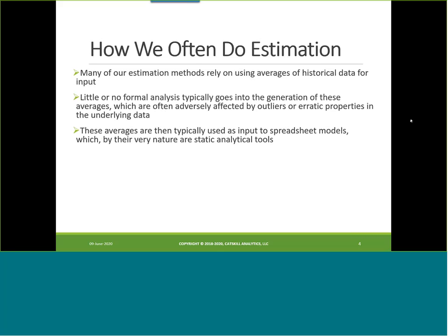What happens with the averages? Then they're typically used as input to spreadsheet models. Unfortunately, by their very nature, spreadsheet models are static analytical tools. In fact, that's why we like spreadsheets, because if you put the same thing in it two times in a row, you'll get the same answer back out. That's a very valuable trait for a lot of things. Unfortunately, for estimation, we really want to understand more about the random and chance nature of the thing we're estimating, and that's very difficult to do with a standard spreadsheet.